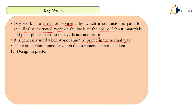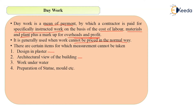Examples of Day Work include designs in plaster and the architectural view of a building. Normal plaster work is measured in meter square, brick work in meter cube, and tiles in numbers or meter square. But special works such as designs in plaster, architectural views of buildings, underwater works, and preparation of statues and molds — these are difficult to measure and cannot be priced in the normal way, so they come under the category of Day Work.